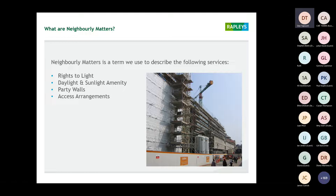Rights to light and daylight and sunlight amenity are your pre-construction aspects with neighbourly matters, and then you've got your post-planning construction phase works with party walls and access arrangements. The photo on the right-hand side — that's a development I was involved with, flanking a river. The building overlooks a fire station who were fine with the redevelopment, but when it came to the cranes they said they were happy with oversailing their airspace, as long as we wouldn't interfere with their radio signals — or the cranes were coming down.